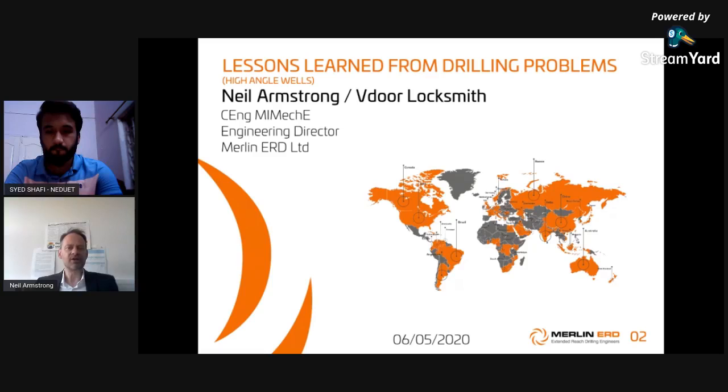As an industry, we're really not very good at learning from mistakes. We don't tend to invest enough time in thoroughly investigating problems. And we tend to ignore near misses as well. And there's a lot of value in the near miss events. We tend to just think, we got away with that one, let's move on and plan the next well. When in actual fact, really, we should be thinking, we were very close on that one. We need to look closely at what went wrong there, because that could have easily been a major NPT event and potentially losing a BHA or a whole section.